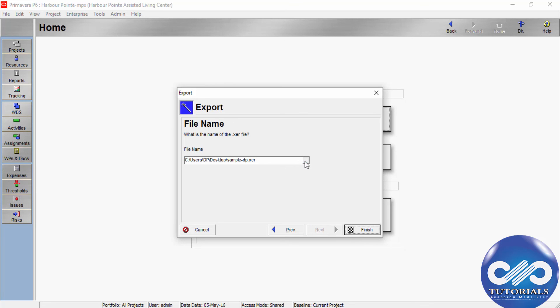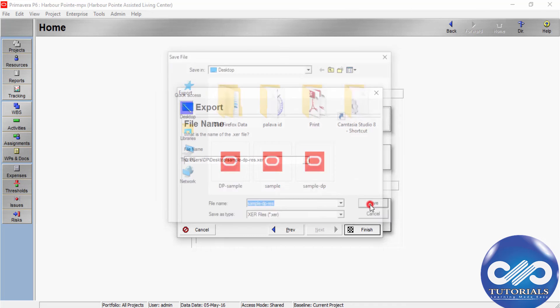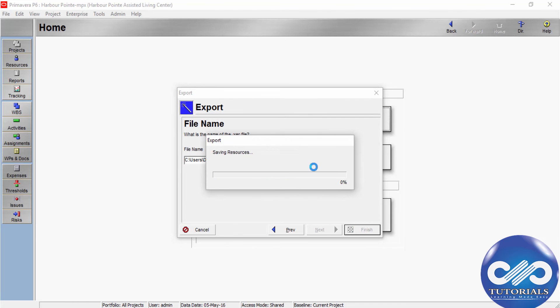Type a name for the XDR file. To specify the location where the file will be stored, click the Browse button and specify the location. Finally, click Finish to export the resources to a single file with an XDR extension.